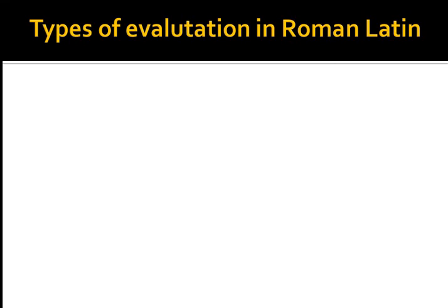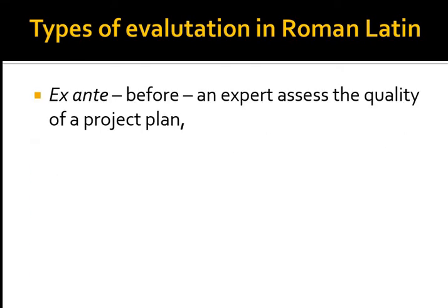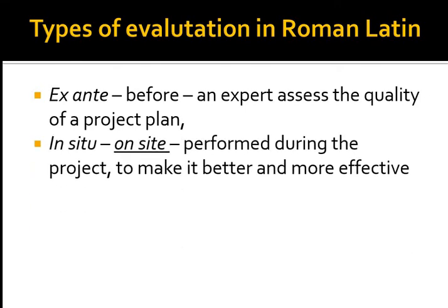It might be interesting for you to know that there are 3 kinds of evaluation. So ex ante, before. So when an expert assesses the quality of a project before the project is executed, also it applies to strategies and things like that. So you need to have an expert, somebody who will use his or her knowledge to check if it actually makes sense, if there are chances that you will achieve your results, your objectives. Then on site, in situ in Latin. So this is basically during the execution phase.